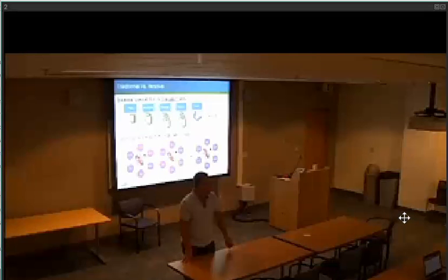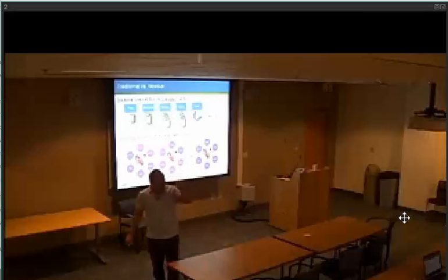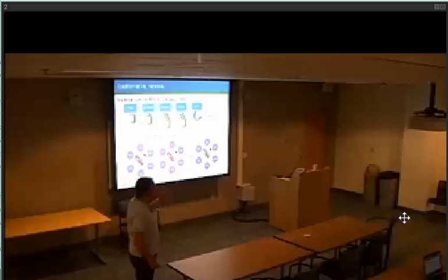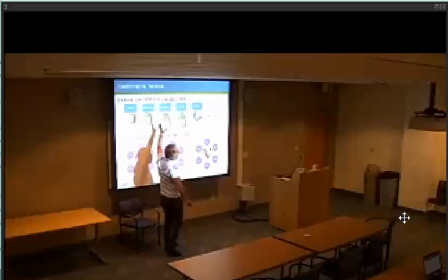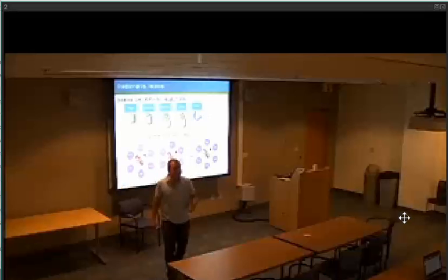Well, it seems like, if you're the DA working on analysis, once you're done, you're done. You pass it on. It seems like an assembly line. That's exactly right, because the analogy comes from the assembly line. This is what's called a push model. A push model is that everybody pushes the work forward to the next stage.